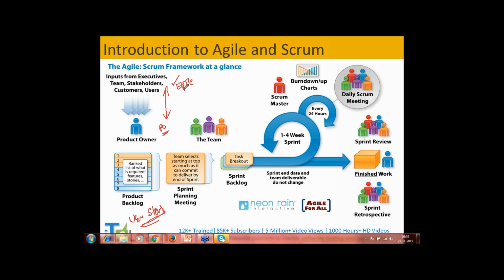So now these epics are broken down into much more detailed user stories with an explanation of, like, "as a user." For example, going back to the first example of tax calculation, as a user, I want to calculate the income tax returns for my annual salary. So that will go more in detail. And similarly, as the owner of a commercial company with fewer than 100 people, I want to calculate the income tax details for my company. So you will probably have two user stories, one for an individual level and one for a commercial company level. Those user stories will be created with much more detailed information.